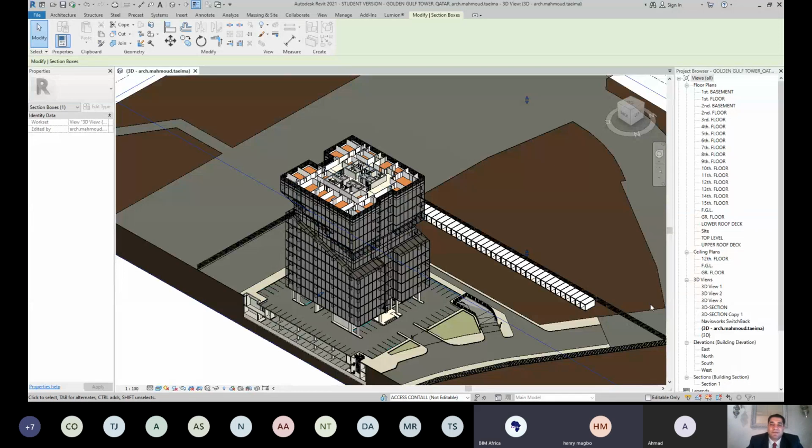For the start and finish time, must it only be Primavera? Does Navisworks also work with Microsoft Project? Yes, because in Microsoft Project you can export the same sheet and insert it, but Primavera is more efficient for construction. And you can make a table in an Excel sheet and insert it to Navisworks.